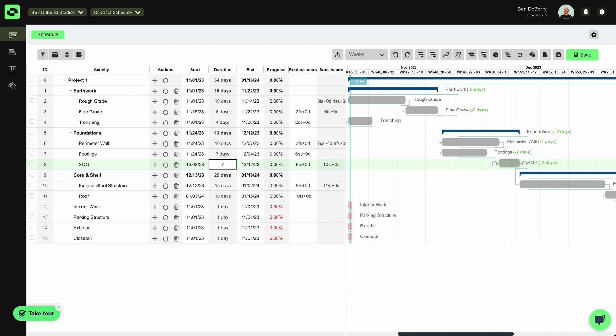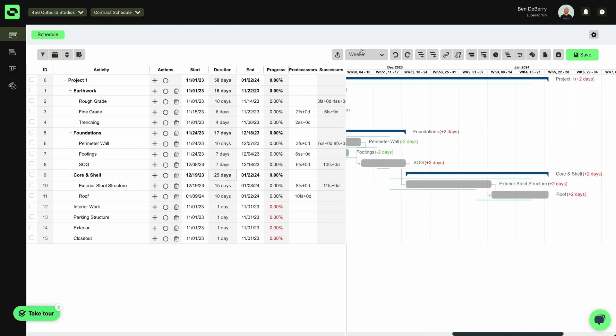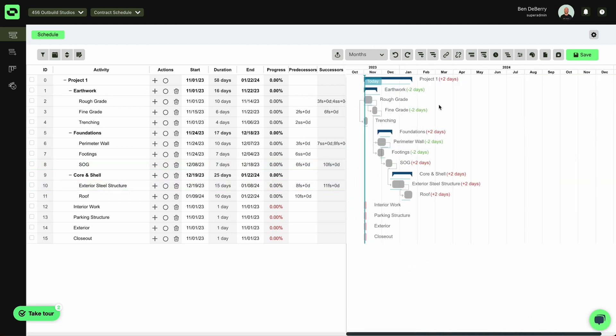And as soon as unfortunately, we hit some rain, Slab on Grade is going to hit seven days, it'll also quickly and easily show me where I am falling behind on my schedule.